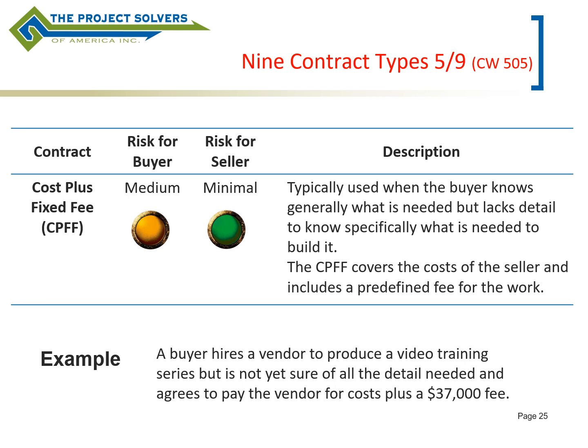The other thing about a cost reimbursable contract is typically, as a buyer, you will need copies of receipts and will need to verify that what you're being invoiced matches the receipts.